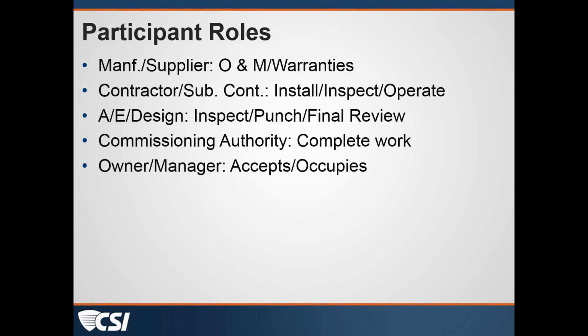So one tip, I guess, would be to try to get some of that stuff earlier on in the process while that sub is still on the job, while the contractor can still get his attention, and have him get that stuff into you so you can review it and get it back to the contractor. You may tell the contractor after you've reviewed it and given him his comments that he needs to get it corrected and hold it and give it to you all at one time at the end, so you're looking at all of it together. But it might be helpful to look at some of that stuff earlier on in the process and not wait until the closeout.